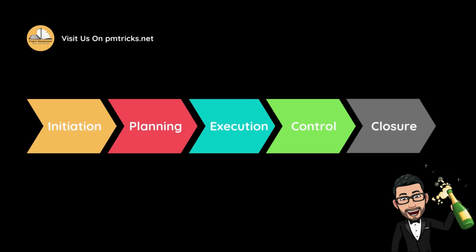Asset management also needs to be taken into consideration if it was not done before. We need to register in the systems what we delivered. Finally, the budget closure will also be required to be done during this phase because we don't expect more costs to be covered, so we can proceed with the budget closure of our project.